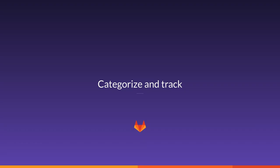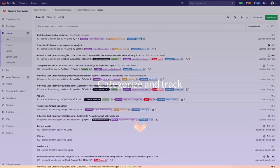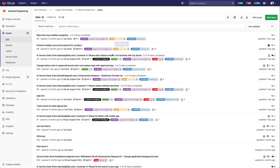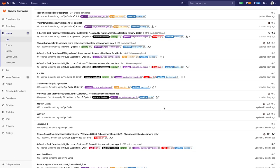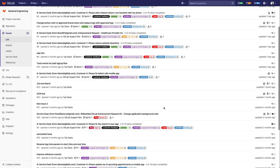Coordinating more than a few people on a single project can prove to be a challenge. When it comes to remote teams, it's even harder to be able to keep track of the status of the work that is being done, and you can't require synchronous in-person meetings to keep everyone on the same page. Labels, which can be on epics, issues, and merge requests, can help by enabling you to categorize your work in many different ways, such as into workflow stages like backlog, development, and QA. Labels are flexible, so another example of their use is to track which issues are from customer feedback.